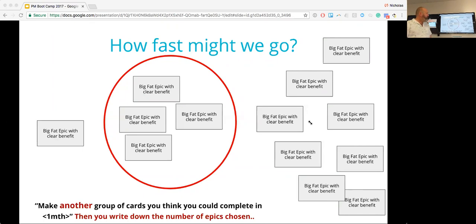I think for this no estimates method to work, they basically all have to be epics. So if you have a bunch of stories, you might want to bundle those into an epic for this. This process doesn't work well when you have tiny iteration level cards mixed with epics. Because of this part here: this part is figuring out what would be a sensible velocity for this team, because without that we can't go ahead with this process. So we want to try and stay at epic level.